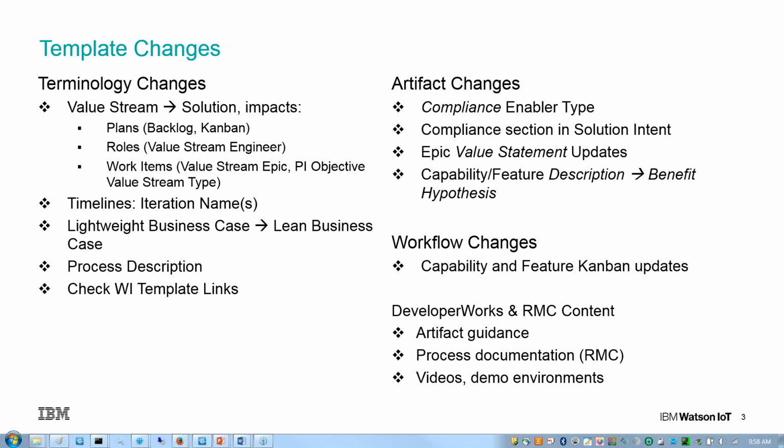Yeah, definitely it's a good question, and I can tell you that in the last 1.5 years, we changed it a few times. In the beginning, we thought we should create a system team in each of the trains, and they would do the system work as defined by SAFe, but also the DevOps activities and things like that. We realized that we cannot push such a big change, especially on the continuous integration and automation, by doing it in the trains. So recently, we actually took people from the different trains, and we created like a mini train, I would say.